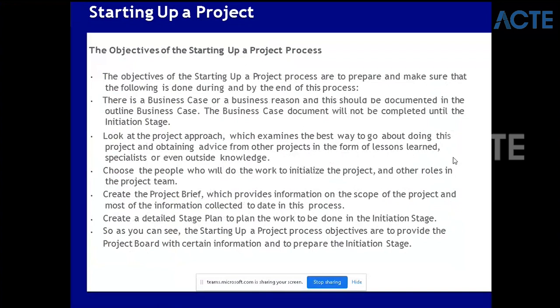Generally a business case is not more than two to three pages, otherwise people will not read it, so try to keep it very short, precise, and concise. Then look at the project approach and choose the people you would like to work with to initiate the project. If the project is looking good, you will try to see if there are people available. Sometimes the project is viable but there is no resource availability, so that is also important to check.